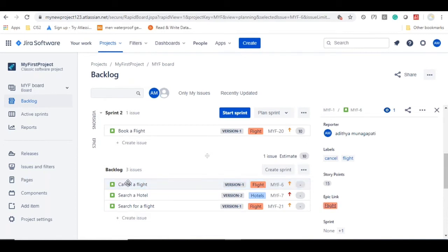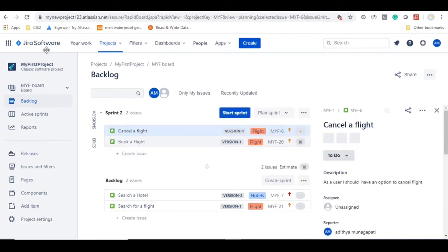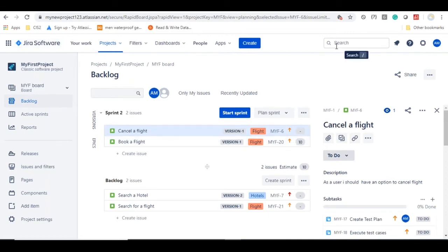So how many user stories is the team going to take like this? On what basis are they going to take them? It depends on the number of resources available in a team and how many working days they have within that sprint. The sprint duration can be minimum 1 week, or maximum 4, or a little more than that. But the ideal duration for the sprint is 2 weeks.